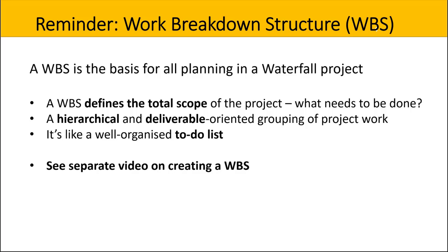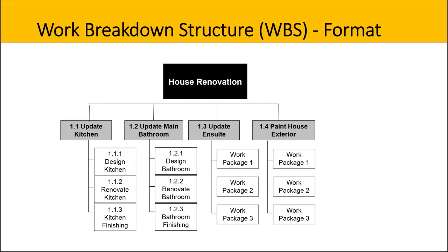A WBS is actually the basis for all planning on a waterfall or plan-driven project. It defines the total scope of the project, answering, well, what do we actually need to do? It's hierarchical in nature and organised around deliverables and tasks. It's essentially a to-do list. I've produced a more detailed video describing how to create a work breakdown structure. Here is the WBS that was shown in that previous video.